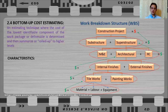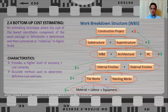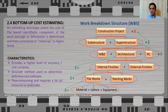The characteristics of bottom-up cost estimating are: it provides a higher level of accuracy and cost certainty, and it is an accurate method used to determine the definitive cost estimate. However, it is a time-consuming activity and requires a lot of resources to undertake, especially for mega projects where you will need a lot of resources and manpower.